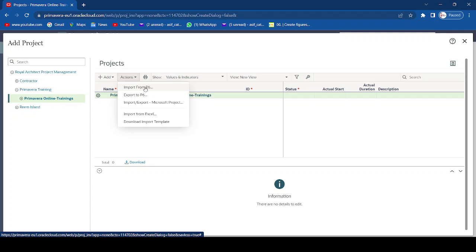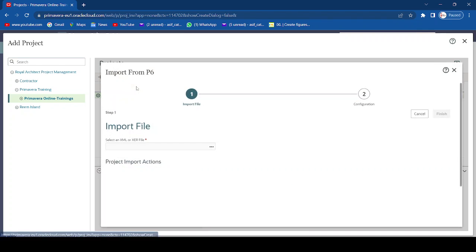If you are transferring from Primavera standalone to Primavera Cloud, you need to first create a structure similar to your Enterprise Project Structure in the standalone app — which in the cloud is your Workspace. After setting up the workspace, you transfer all your data from standalone to the cloud. For example, under one workspace you can have Project 1, Project 2, Project 3, and under each project you can have baseline, update, claim, etc. We'll now click 'Import from P6'.